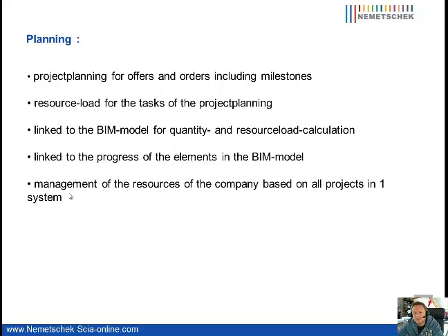The project planning tool is for offers and for project orders, including milestones. You get information in the project planning on resource load. Very important also, it is linked to the BIM model, so automatically the resource load and the quantity are calculated and adjusted in the planning.